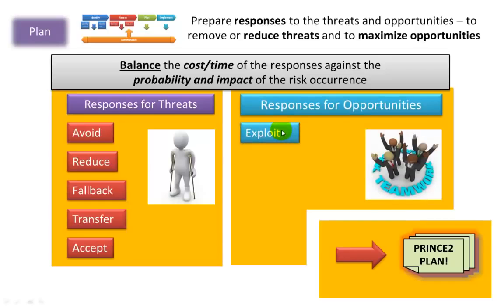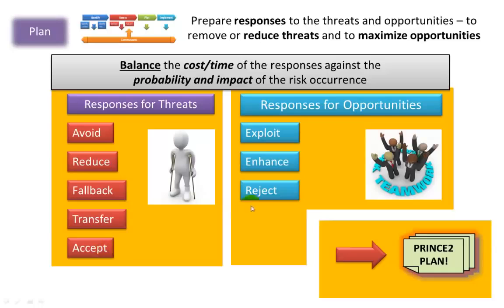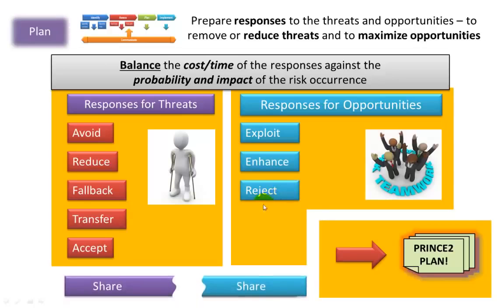When it comes to opportunities: Exploit — take action to increase the probability of the opportunity happening. Enhance — a response that makes the opportunity even better if it happens. Reject — similar to accept for a threat; a decision not to take any actions for a particular opportunity. There is one response usable for both threats and opportunities: Share — a pain/gain formula where in the case of a threat the financial pain is shared between both parties, and in the case of an opportunity some form of payment or costed benefits is shared between both parties.